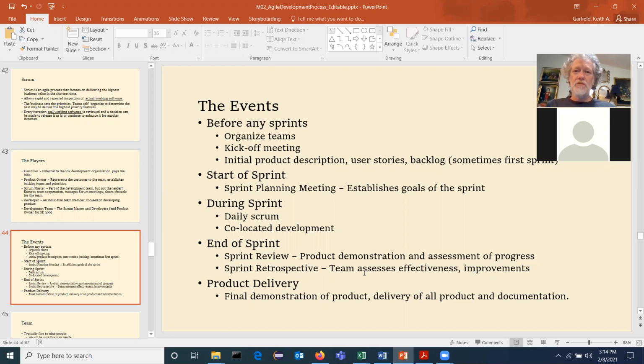So you've got maybe 14 actual working hours. 2 hours of that are going to get eaten up with just junk, answering email or junk. And so you maybe have actual 12 hours of development time. So what this is doing is giving you a way to establish a load that is achievable and not overwhelming in each sprint.